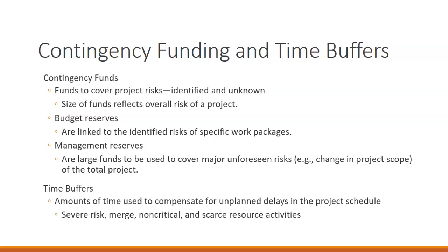We might want to build in different kinds of time buffers into projects depending on what they are. As I said earlier, time buffers are very important when we're talking about projects that are happening outside and can be affected by weather more commonly than projects that are happening indoors and aren't as affected by weather.